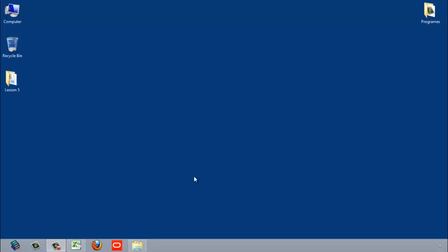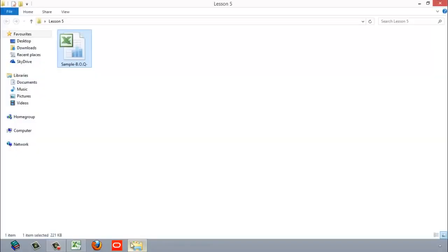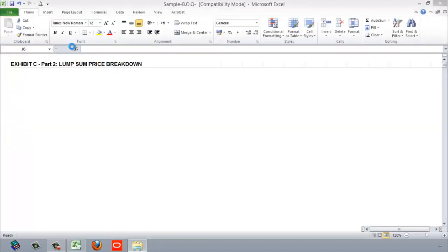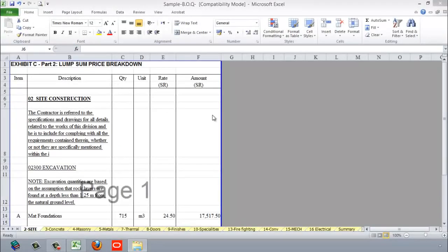In this video, we are going to check the BOQ and how to work with the BOQ. Of course, download the sample BOQ from the page and open it. Let's see what is inside the bill of quantities. The bill of quantities is very important to prepare any schedule, and this will be our core source of information.